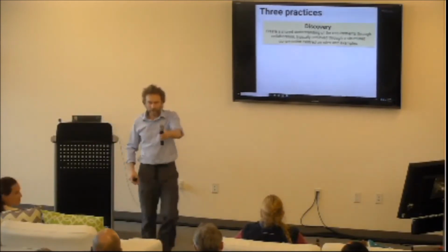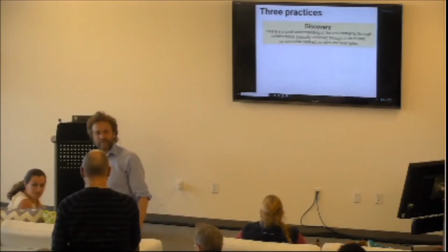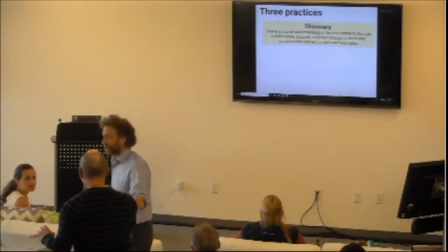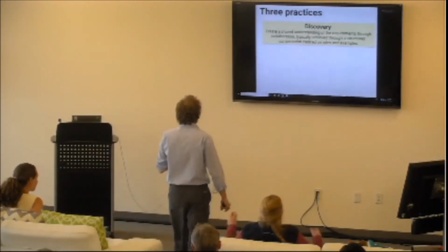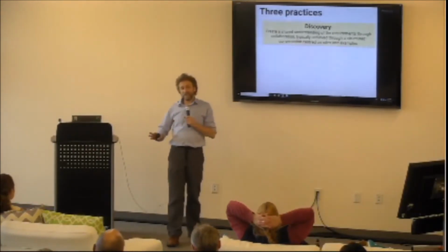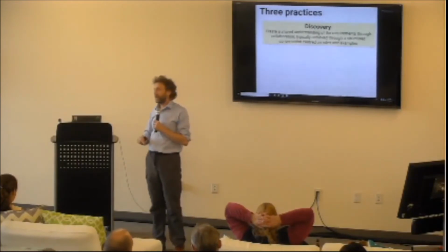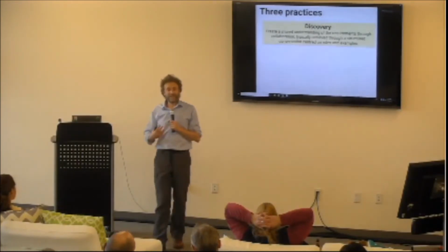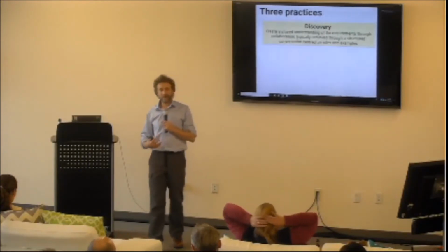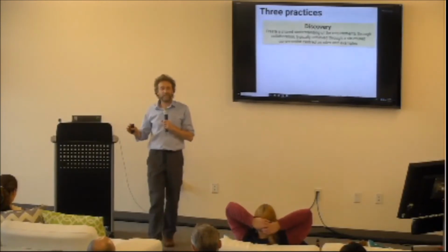Joe? Balance between discovery and what some would consider to be taboo, which is scope creep. So the question was, how do you balance between discovery and scope creep? And there's no solid answer, but basically one of the people that is involved in discovery is the product owner. The product owner faces off to the business. They are your portal to what the business requirements are. If the product owner decides to go in a different direction, you go in a different direction.